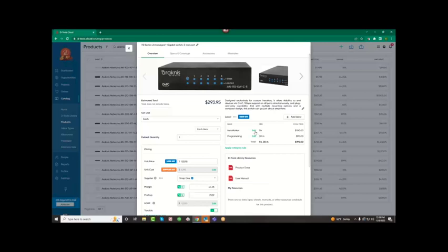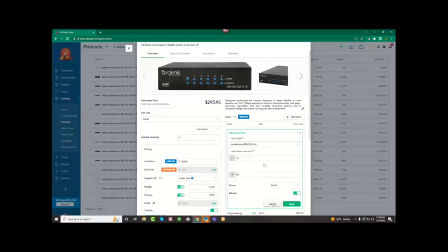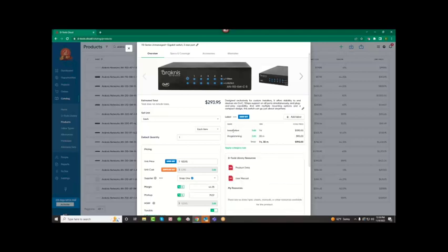So we're going to give you that installation rate. It's really easy to adjust. If you guys have me on the team, you might want to tack some hours on so you don't lose money. But tying time to equipment is our default best practice. There's a lot of companies that prefer to manage labor different ways, and just know that you can manage that. We have all the tools to accommodate the different methods in which companies like to manage data, but our best practice recommendation default method is by tying time to product, right? So that's where we'll give you the installation rate.